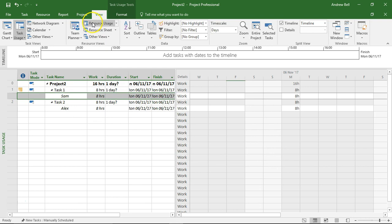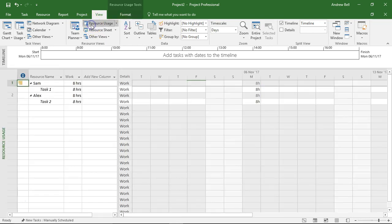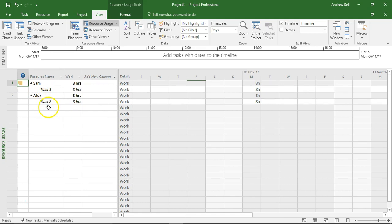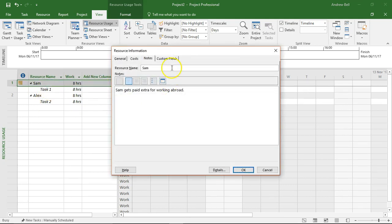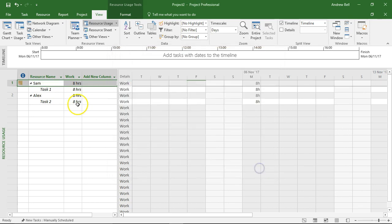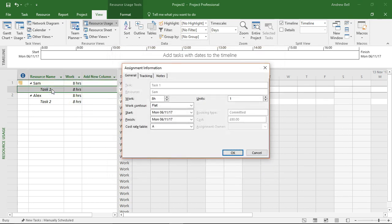A similar view is the resource usage view. This is now a list of the resources and the tasks that they do. If I double click on Sam I'm going to get resource information. If I double click on Sam and task 1 I get assignment information.